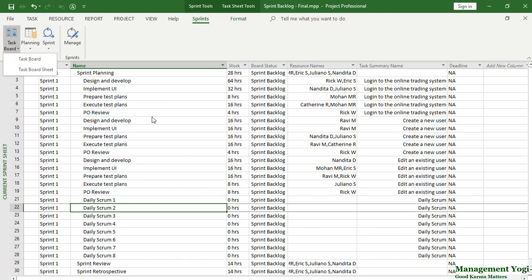Third key point: as you can see in the Current Sprint Sheet view, there is no summary task with subtasks indented underneath. This creates huge confusion for traditional MS Project practitioners, because they are used to seeing a summary task with subtasks below it. This is not available in the Current Sprint Sheet view or the Sprint Planning Sheet view. The reason is filtering — it is designed to filter out the summary task.